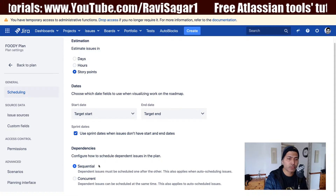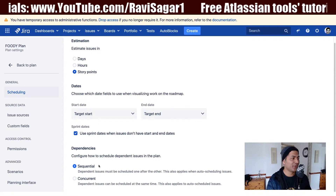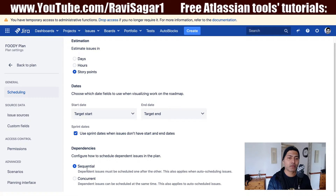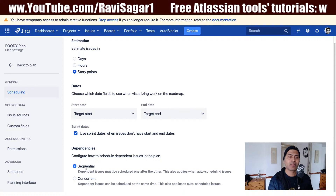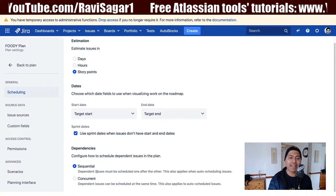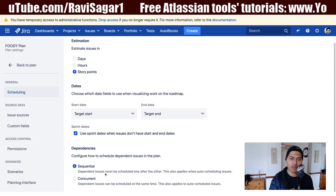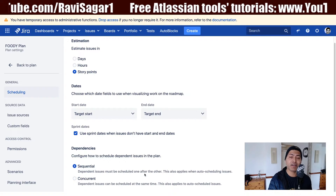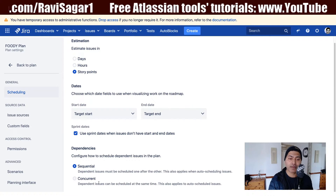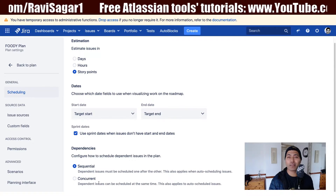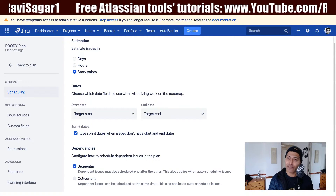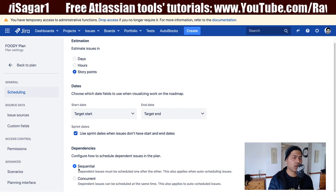You also have the option to define how you are going to configure your dependencies. You have two options: sequential and concurrent. When you select sequential, which is the default, dependent issues must be scheduled one after the other. If you select concurrent, dependent issues can be scheduled at the same time. In most cases where you are waiting for something, the sequential option is more suitable.